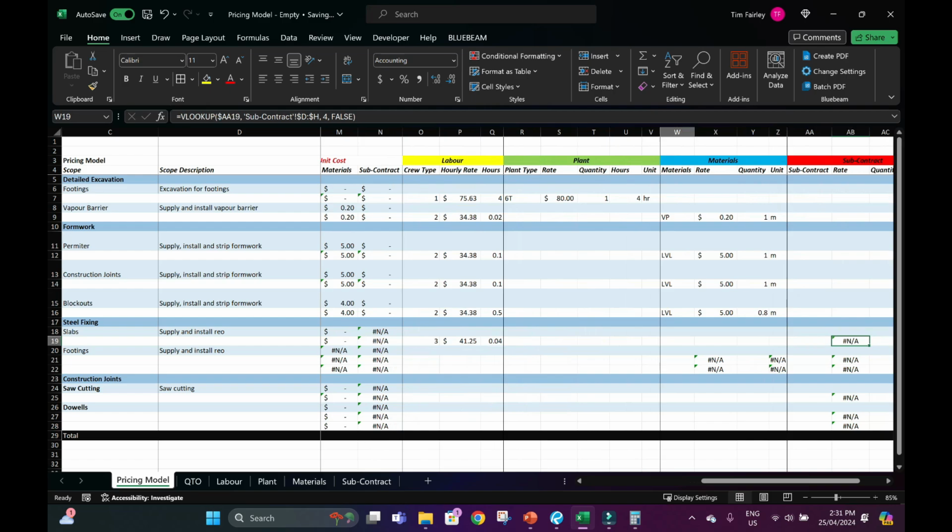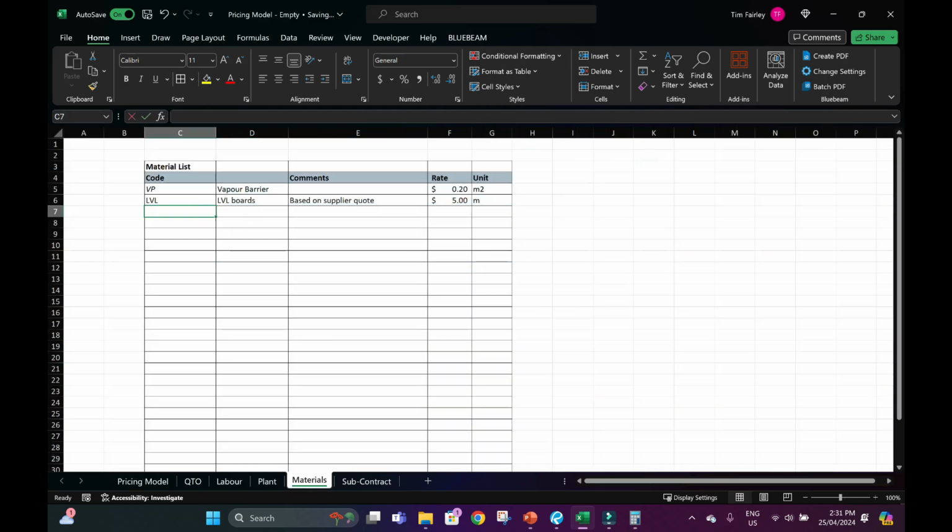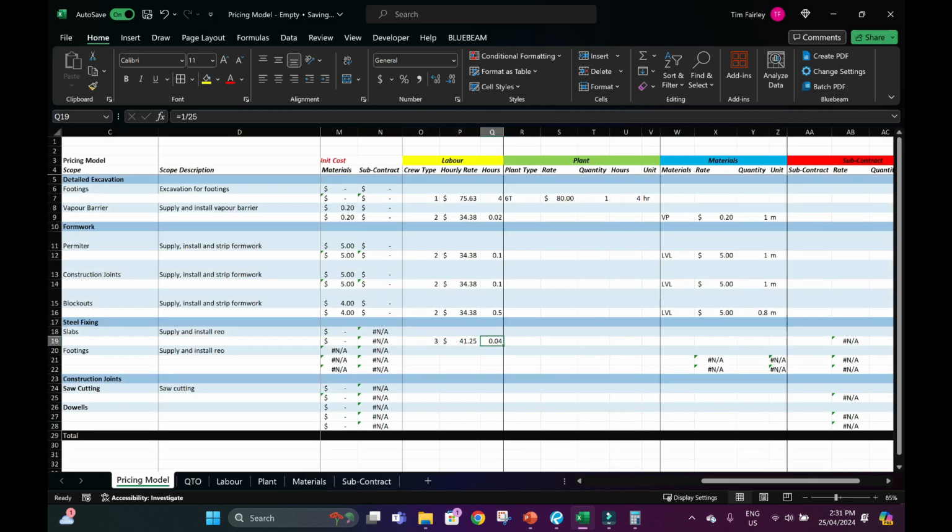And the mesh, we'll say we got SL81, SL92, SL81 steel mesh, and then we got a quote of $20 per meter squared. And this is a bit bigger, so it's 24 per meter squared. That is probably, we'll say 20 meters squared per man hour.